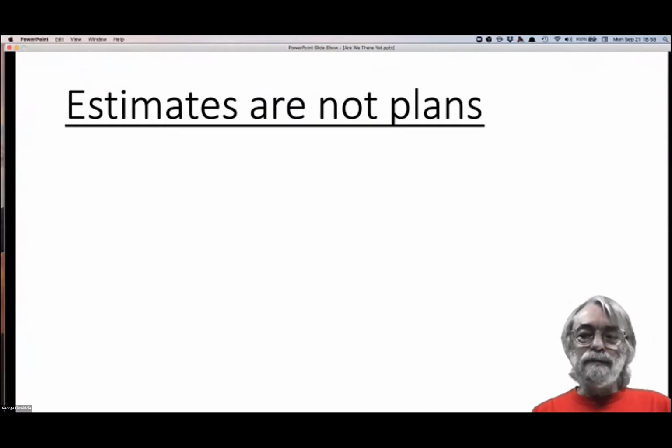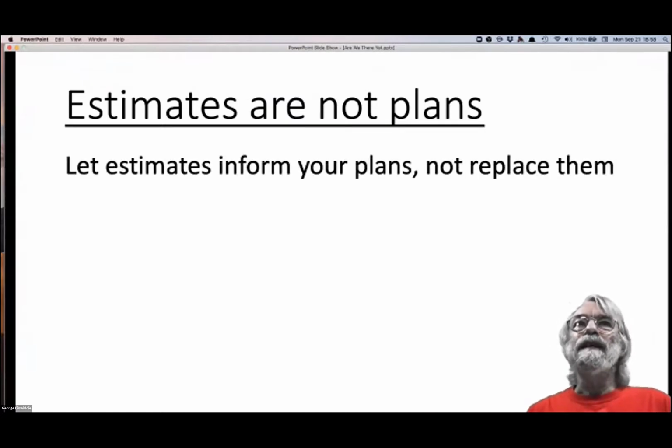You probably want to let your estimates inform your plans. And if you start out estimating the shortest time we can get to our destination, and then treat that as a plan, then you've guaranteed a death march from the very beginning.